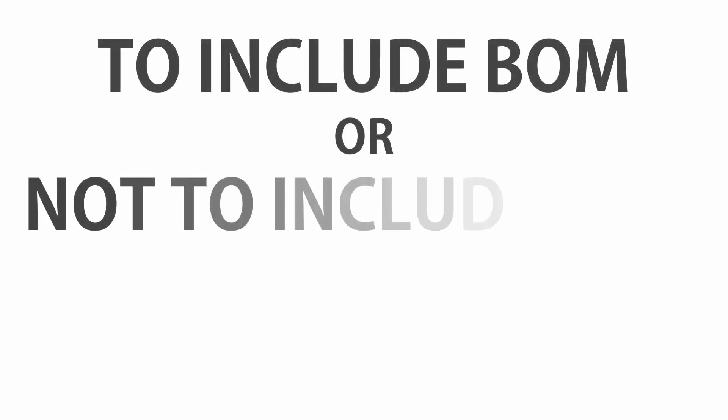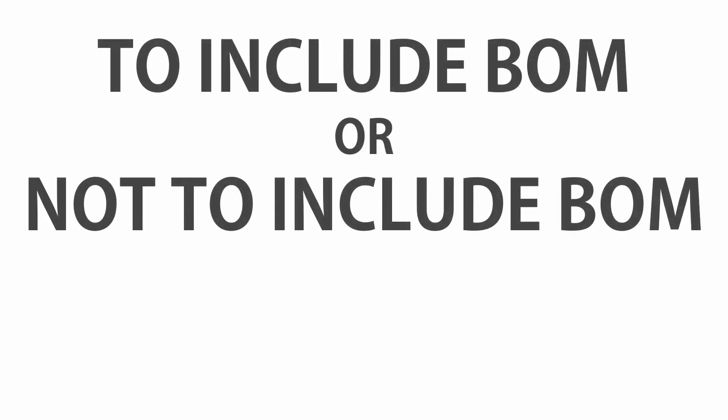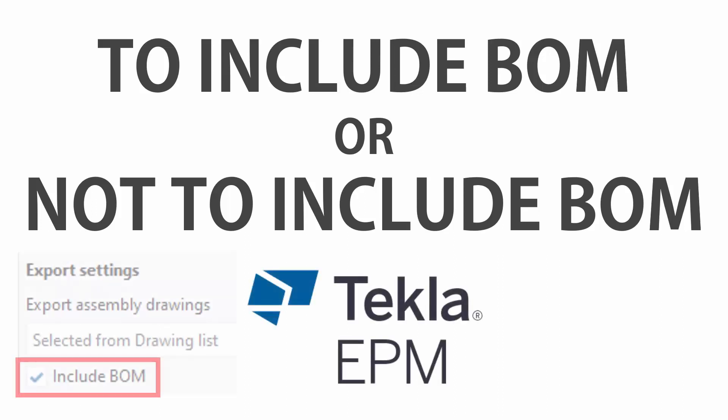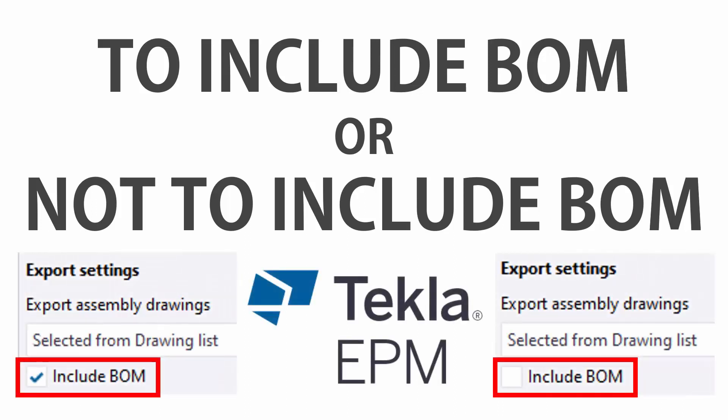In this video we're going to analyze whether to include the bill of material or not in Tekla EPM — that is the question. We'll look at the nuances of why we would include the bill of material for a construction package, and why for an IFA (issue for approval) package we might not include the bill of material.